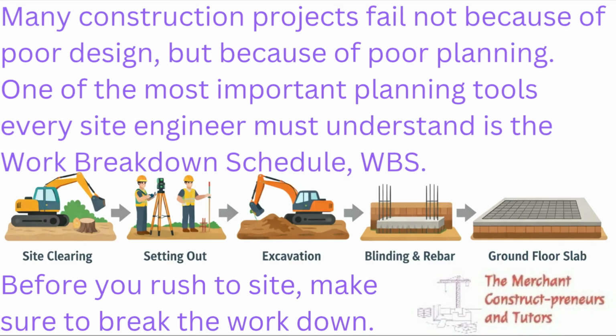Just like I said, you can see from the image there, we have site clearing, we have setting out, we have excavation, we have blinding and rebars, we have the ground floor slab. All these are steps that will guide you in ensuring that you achieve the objectives of the project. So before you rush to site, make sure to break down the work. Even if you don't understand these things, you ask questions, you do research so that you are guided.